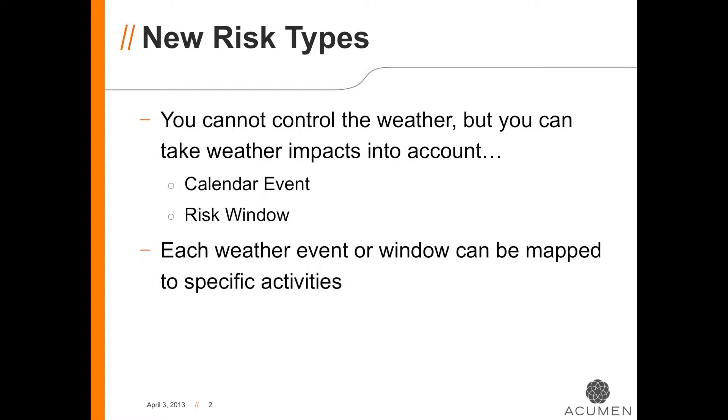The most typical application of events and windows is weather. Weather may not impact every activity in your schedule and it may not be a certainty at all. Using Acumen Risk, we can specify different types of weather risks, the potential for impact, and which specific activities they will impact if the weather event occurs.